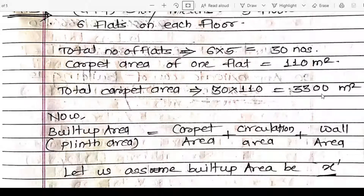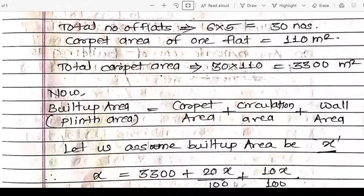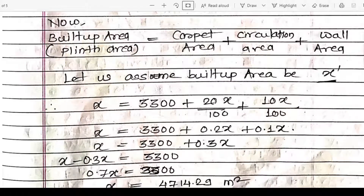The extra area for walls and circulation is given on a built-up area, not carpet area. The built-up area (plinth area) equals carpet area plus area for circulation plus area for walls. Let us assume the built-up area as x. So: x = 3,300 + 20% of x + 10% of x, which gives x = 3,300 + 0.2x + 0.1x.